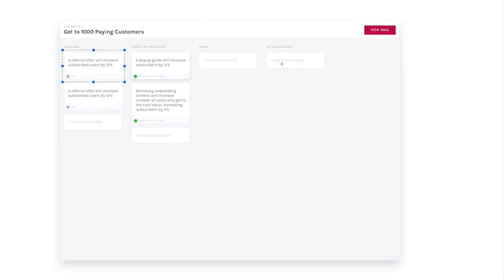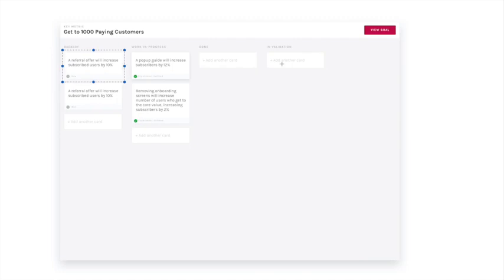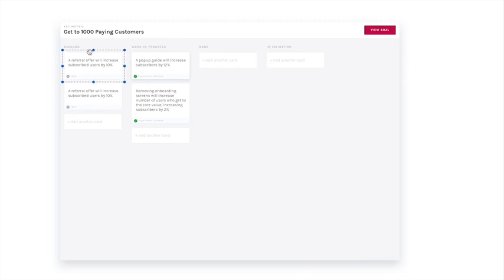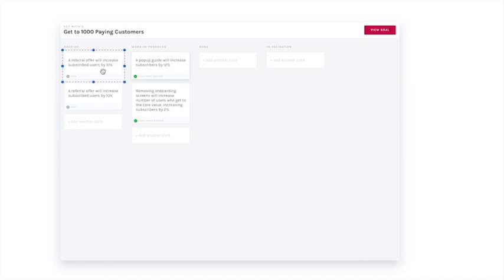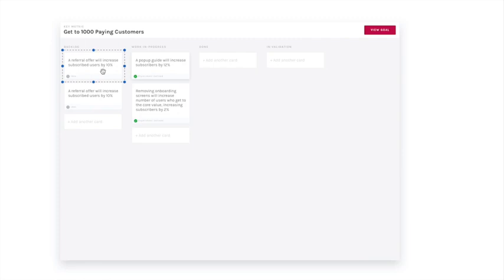Did this increase paying users by 10%? If so, great. That means we validated this idea. If not, why not? And we delve in and learn about that. This requires us to be able to know this - how did it increase by 10%? We need somebody taking responsibility for the analytics with your product. We need analytics built into every experiment we do so that we can track it.